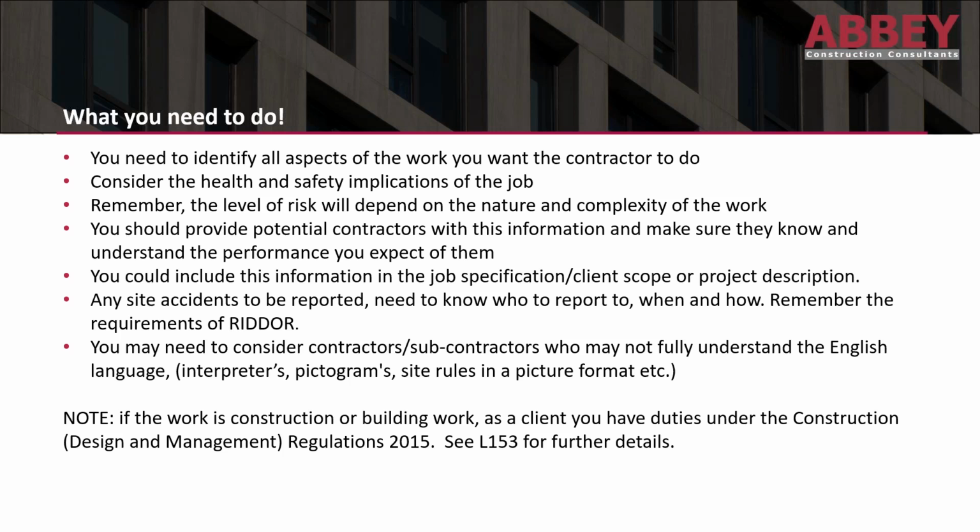So there may be a requirement for an interpreter. It might be used for pictograms rather than text information. Site rules may be in picture formats. And note, if the work is construction or building work, as a client, you have duties in the Construction Design and Management Regulations 2015, or the L153 series will provide you with more definitive information regarding that.